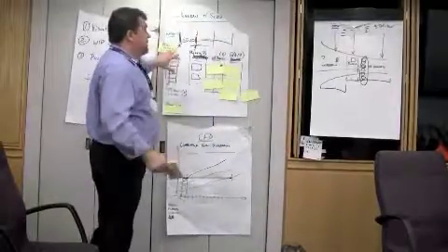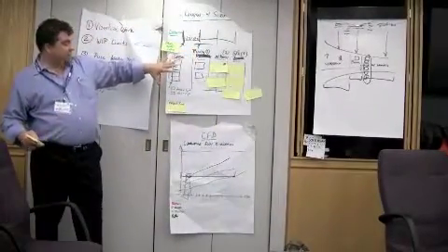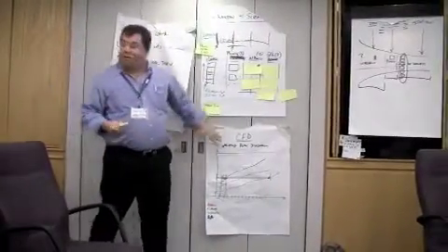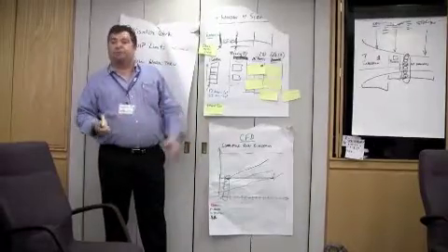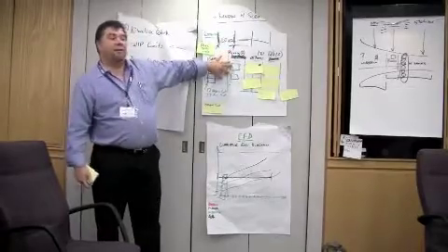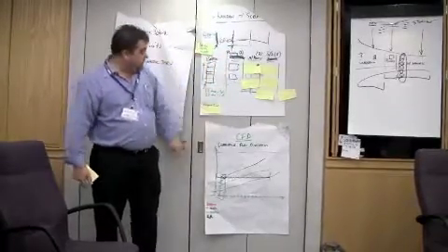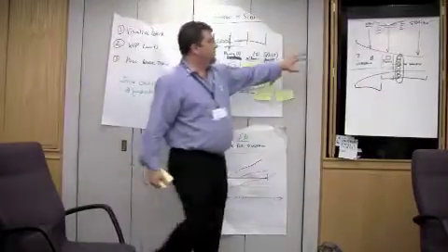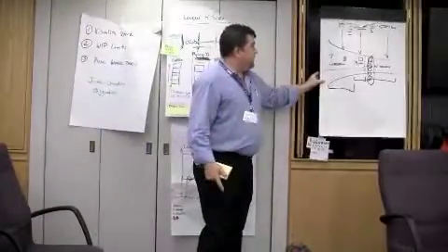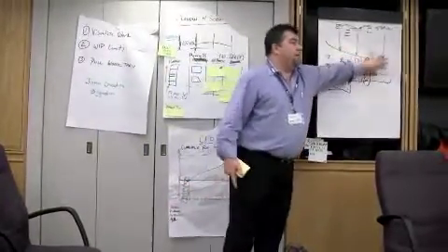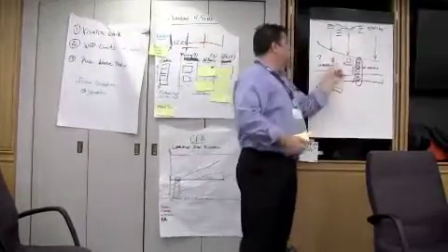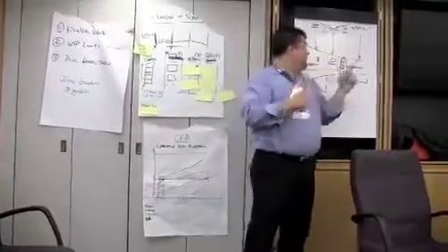So I got 2 more minutes. A couple of tools that we use in the Scrum world to do the planning and tracking. We do things differently than you do in the normal Scrum extreme programming world. I'll still use story points on cards if I want to know size, but we try to pretty much make the cards same size if at all possible. We use multiple boards. I don't just use one board for the team, but if you're familiar with this, there's like this cone of planning uncertainty. Early on, you just have some idea, and then pretty soon you get some idea of what it would cost and what the return might be. It gets into more detailed planning.